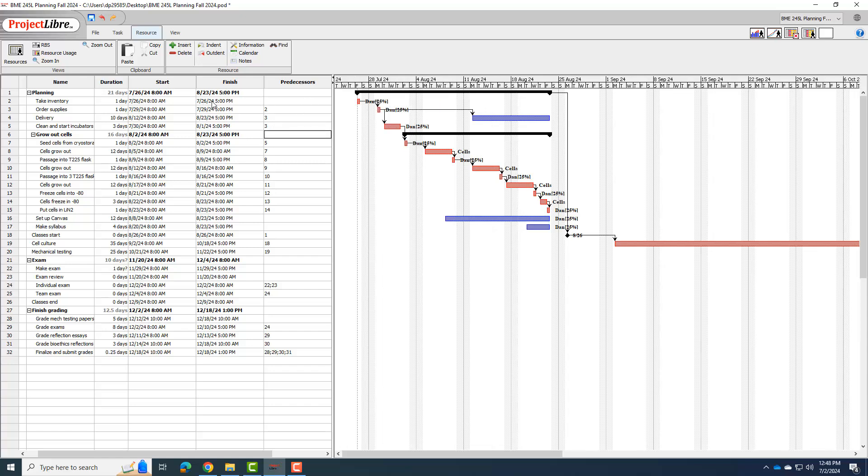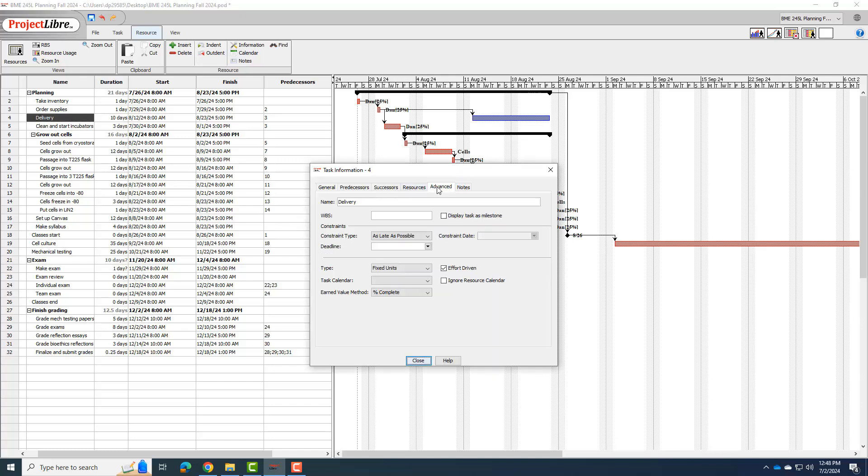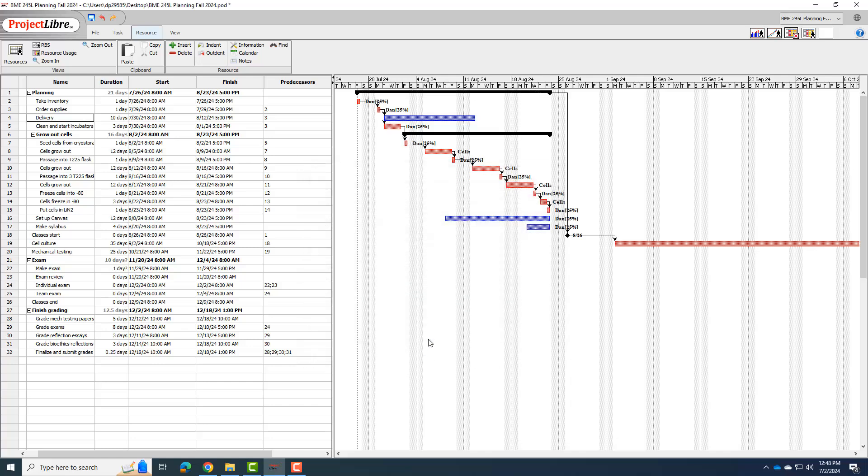Okay, so you see that did move my take inventory or supplies, but then there's this weird gap to the delivery, which is not going to happen. As soon as I order, that's when my 10-day delivery is going to show up. So I can go into delivery and change it. Because if I look at the advanced, it's saying schedule as late as possible, but really I want to schedule, make that happen as soon as possible. Okay, so that one's okay that it's being delivered at the same time I'm doing these other tests because it's just some delivery person. It's not me.